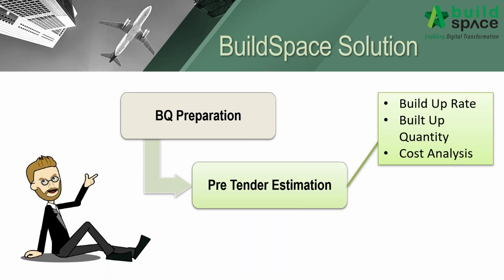Now that you already have all BQ descriptions in the system, it's time for you to prepare a pre-tender estimates. Well, in real life practice, pre-tender estimate is often prepared by QS consultants. This will be their benchmark pricing details. A pre-tender estimate sits somewhere between cost planning and the post-contract cost control. It is the quantity surveyor's final costing of the works before they proceed to tender the project.